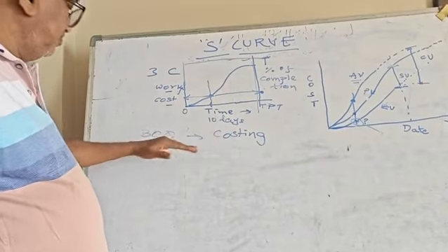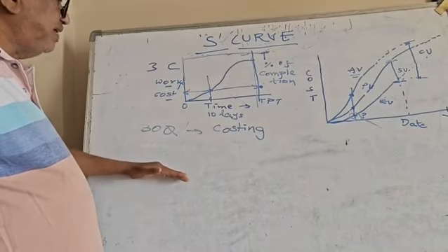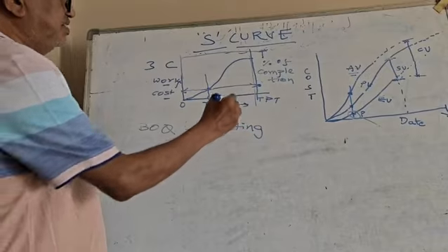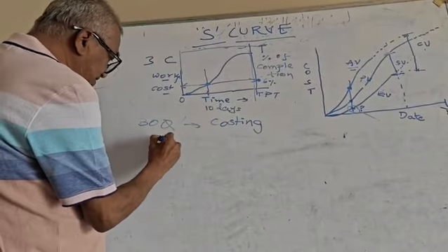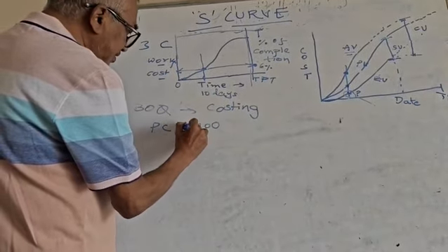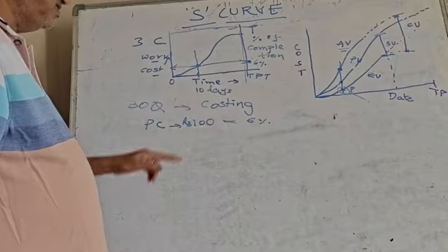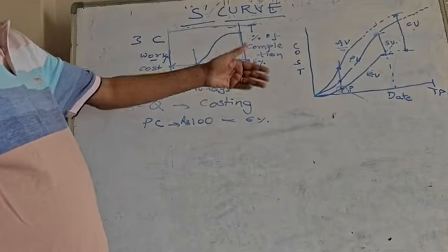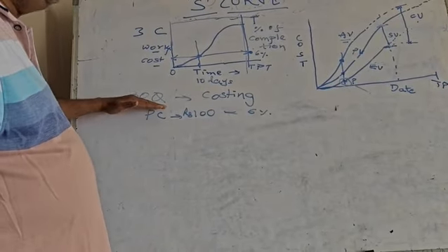See, from this BOQ, in 10 days, how much has to be completed and how much money has to be paid. You can see this point. You can take the percentage of completion. Suppose this is 5% or 6% completed, and the total project cost is suppose 100 rupees. You just go for 6% of this. So pay 6% of 100 rupees, that is 6 by 100 into 100. So you can pay 6 rupees. That means 6 rupees in the BOQ, where it stands.